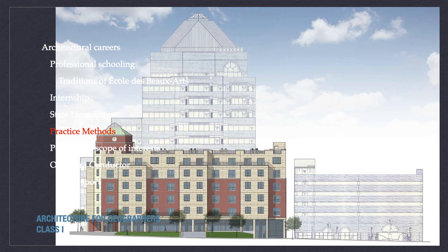During the practice of schematic design, the architect will typically develop a number of schemes, usually 3, an eeny, meeny, miny, mo, for the client to choose between that shows different dispositions of the spaces and different arrangements and their budgetary impact. Once the client has selected one of the schemes, they will then develop that into a full set of schematic documents that shows the aesthetics of the project, the scope and size of all the spaces in 3 dimensions, and develops the initial budget.